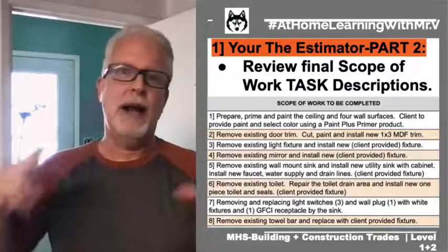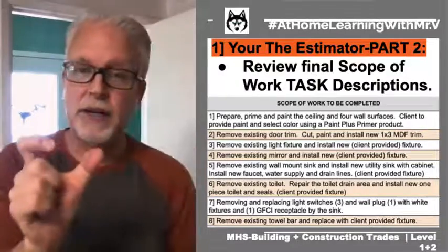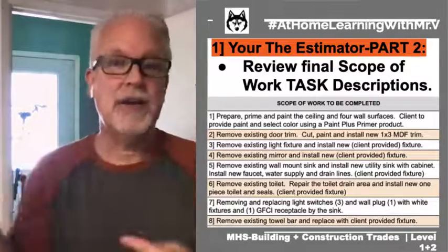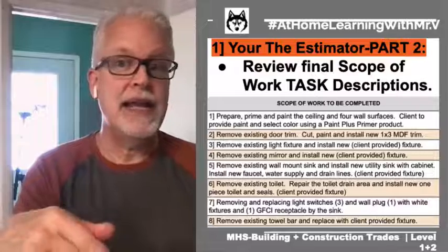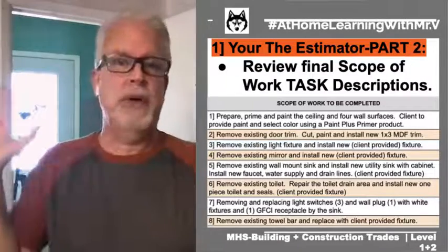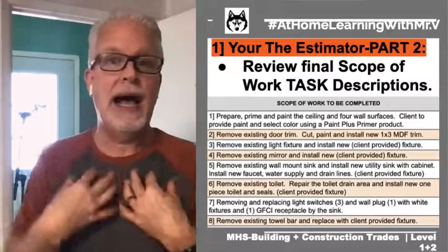Yeah, perfect. So I want to keep saying this because I'm using that terminology, and that right there literally is a legal agreement between us as contractors and the client. And anytime that's in the description and the client has signed off on it, boom, I am off the hook. If they don't purchase that and get it to the site, I'm not responsible.